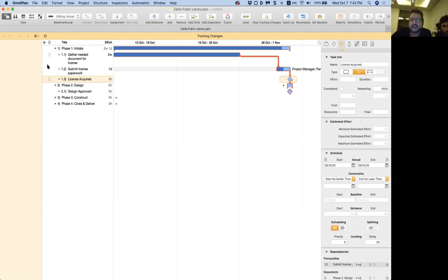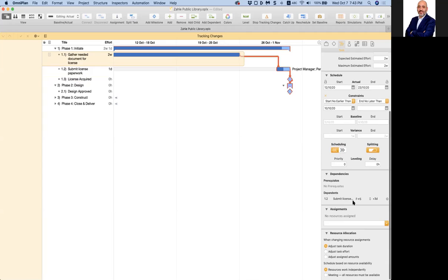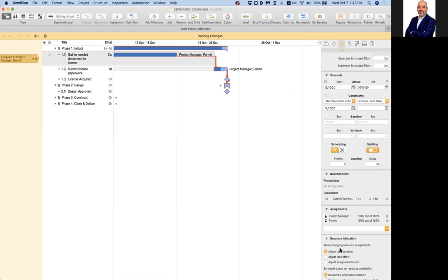لا بس بعد في شغله قصه انه سكجول ما في ريسورسز حطينا عليه كاماونت، انه ليه عم بيطلع معي انا كيف طلع كونفرتد لماني ايكوال ماني يعني؟ ما هون نحن بالتاسك تحت على اليمين اذا بتطلع قلنا انه حطينا هون ما حطينا ريسورس. You're right. خلينا يعني نحط هون. ما حاطين ريسورسز سو البلان انا مش مفروض يكون يكلفني، يعني طلع عندي نيجاتيف، طلعت عندي الفارينس عالي. صح. خلينا نحط ريسورسز البروجكت مانجر وبيرميت. احول حطينا الريسورسز. ليش نزل لي اياهم؟ لانه حسبها effort driven.